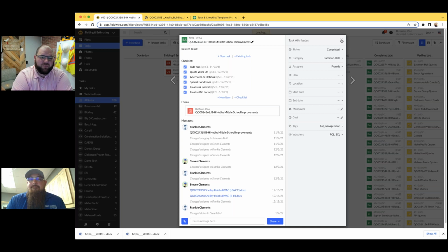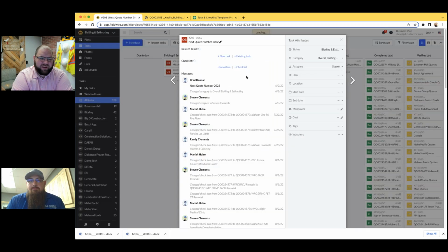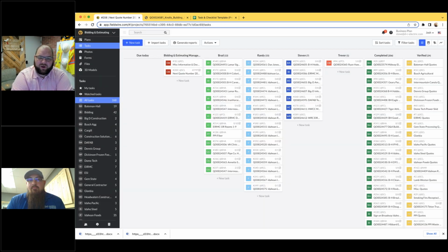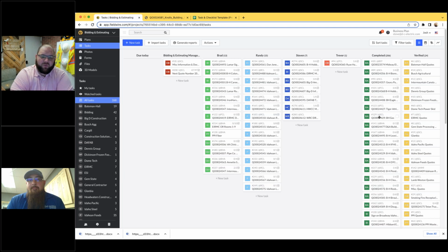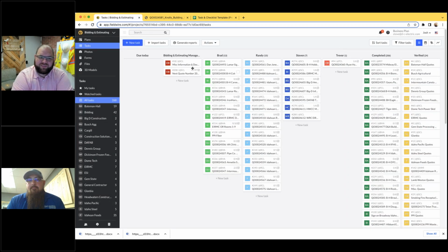One of the things that I wanted to point out was the idea of being able to track over here your individual checks, and what's been sent out, what's pending, what's not. So another option that a lot of people aren't aware of, and I know every company's different and the way they operate, but being able to utilize the start and end date here gives you what I call the free three statuses. So if you utilize the start and end date on any task, whether it's a bidding opportunity or not, you're able to go through and create a due today, in progress, and overdue task. So if you have your actual end date for your quote, you can put it in there. Stephen and his team have a great system set up, but just know if you're trying to set that up, that is an option as well.